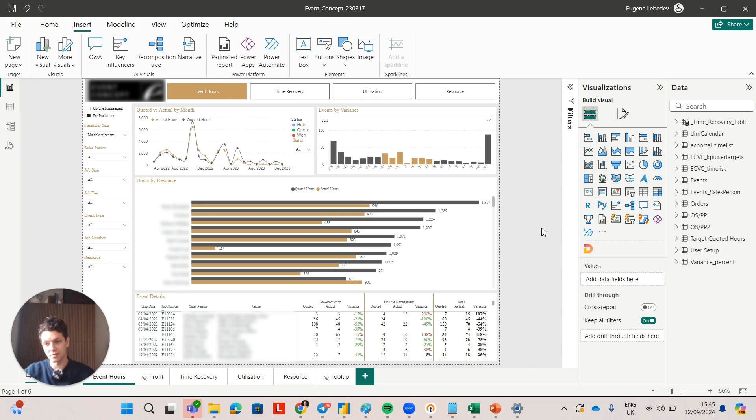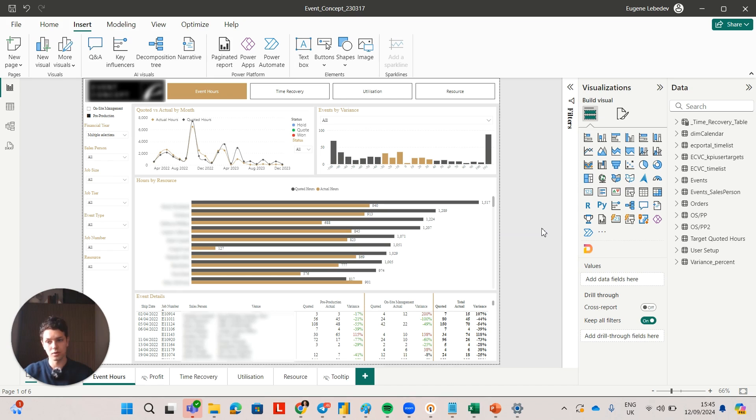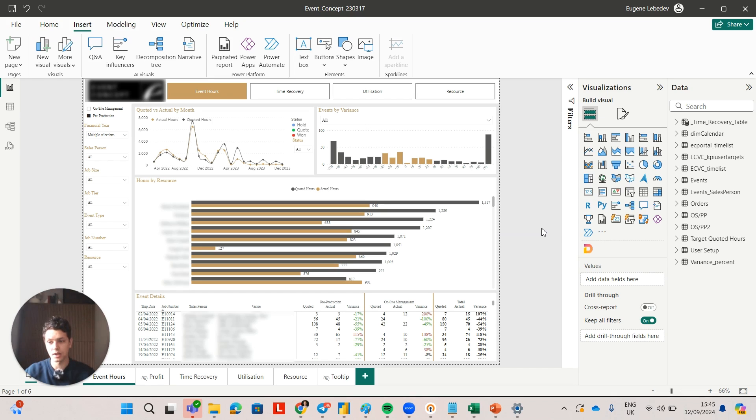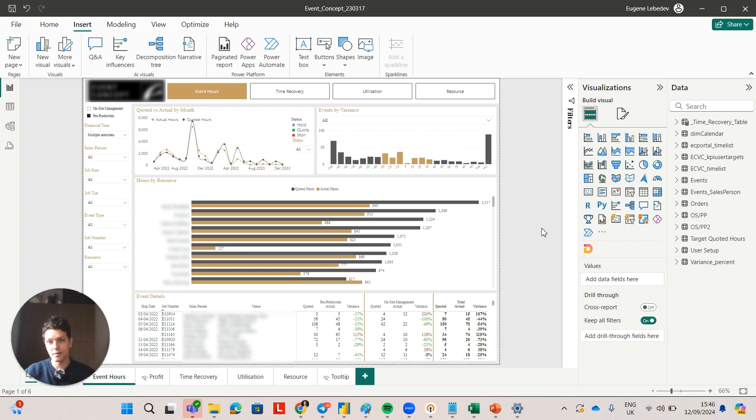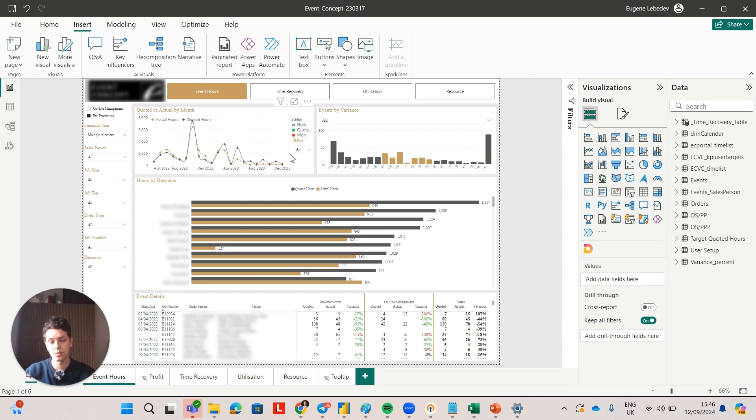If you work significantly more hours than you quote for, then you're definitely less profitable. So completing proper analysis on this topic and taking action on it can actually help you identify areas where you can improve your actual versus quoted hours and therefore your profitability. A C-level executive wanted to see the trend for actual versus quoted hours, which you can see here at the top.